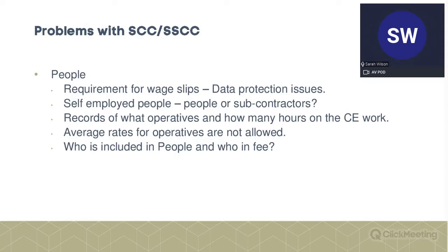And what we often see is the project manager wanting to see how you've calculated the cost of people. And it's not just, oh, we pay our labourers X pounds per hour, and then you add on all the extras. So it's X plus Y equals Z pounds per hour.